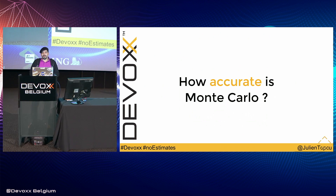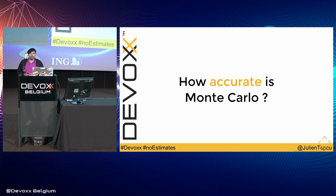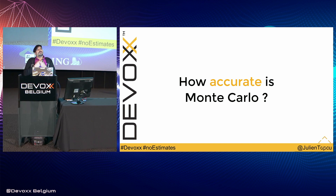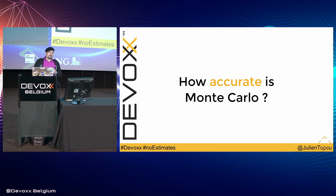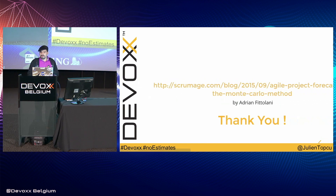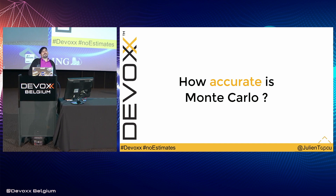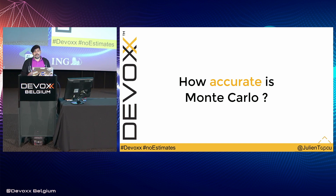Another question: how accurate is Monte Carlo? That's not really the point, because we don't try to know exactly when everything will be released. This is a tool to help you make decisions and start your mutation — the adoption of No Estimates — where you prioritize by value instead of cost. If you're in a phase where everything is really stable, the tool can be very good. For example, in one of my teams, on a three-month project we had an error of two weeks to one month. But when there were a lot of turnovers, we couldn't use the tool effectively.